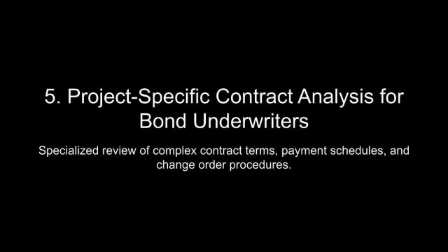Ambiguities in defining the conditions that trigger liquidated damages can lead to disputes, complicating enforcement and increasing bond exposure. For instance, a clause that fails to account for delays caused by force majeure events, such as natural disasters or supply chain disruptions, may be challenged in court, leaving the project owner without recourse and the contractor vulnerable to unnecessary claims. Underwriters must assess the precision of these clauses to identify potential loopholes or ambiguities that could undermine their enforceability.